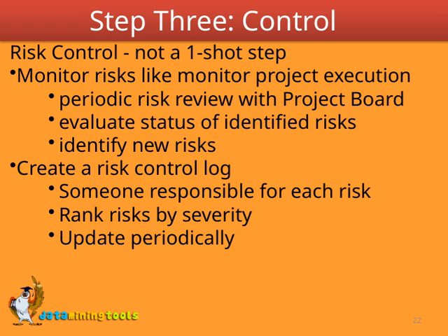To keep everything organized, we create a risk control log, which is essentially a record of all risks, who's responsible for each one, and their current status. Assigning someone responsible for each risk ensures accountability. We then rank these risks by severity so we can focus our attention on the most critical ones first.